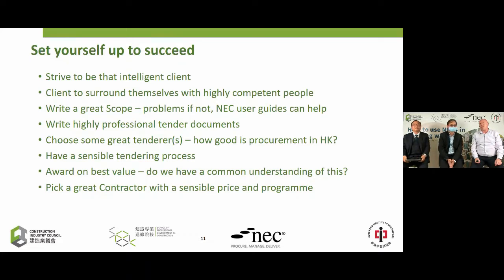Work with the very best contractors that you can. Improve your procurement routes. Ask the right questions at the right time. Do not let contractors onto the list. If you're competitively bidding, don't let them on unless they satisfy certain criteria.